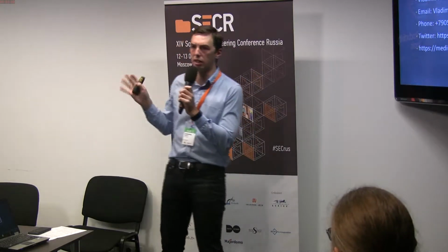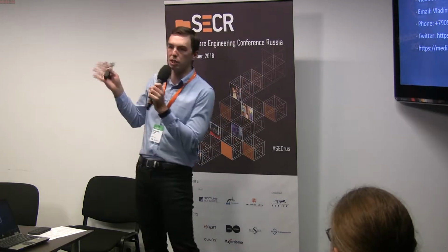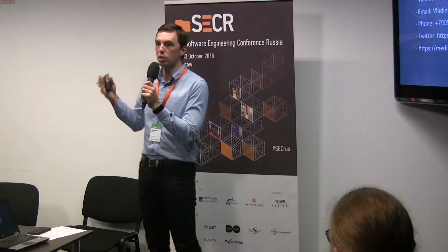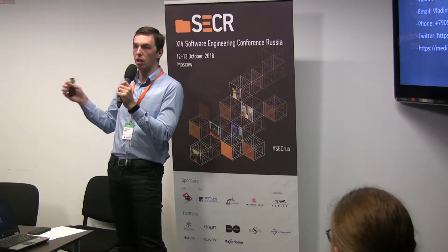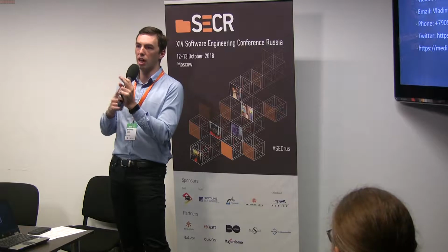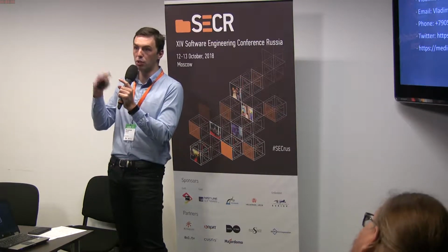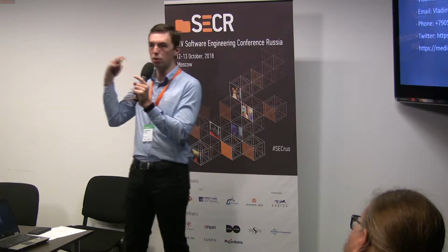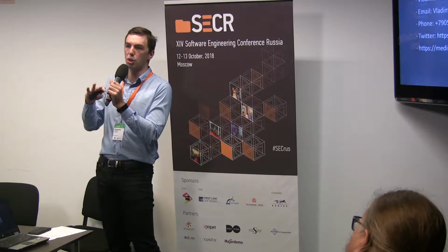So it's a resource plan, an agile project management plan, a risk management plan, a statement of work, and a solution architecture document, and the latter is the document that solution architects actually write. The solution architecture document includes everything: the architecturally significant requirements, the diagrams. It may include a baseline architecture if we're in brownfield and need to transit the system from a previous state to a new state. The target architecture with several views, the description of all of the components,